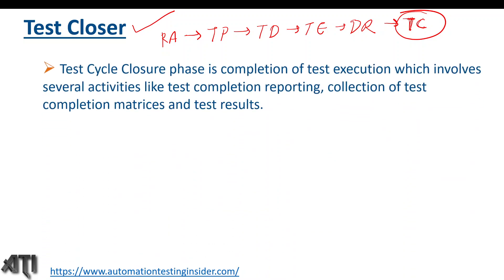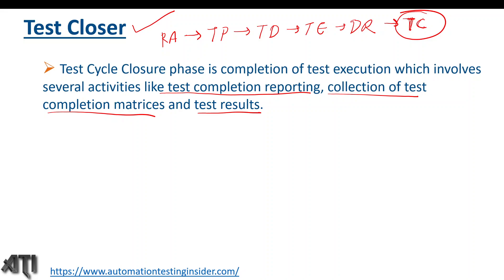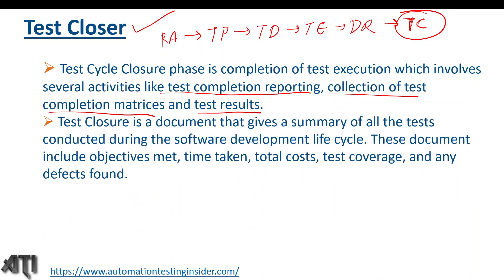Test cycle closure is the completion of test execution, which involves several activities like test completion reporting, collection of test completion metrics, and test results. Once testing is done, we have to provide deliverables to the client — including the test completion report or test summary report, metrics like test coverage, how many test cases were authored, how many were executed, how many passed or failed, how many defects were reported, the defect rejection percentage, and accepted defects.